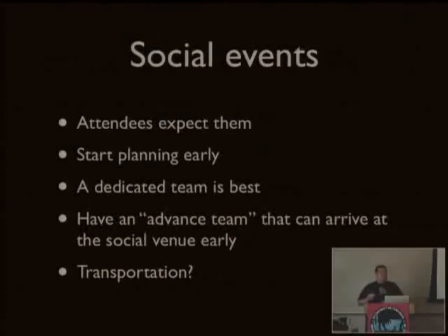Another reason you want dedicated people to take care of your social event is that about halfway through the day of your actual event, those people are going to need to get up and leave and go to your social venue to make sure that everything is set up and ready for whenever the participants arrive. If you have one of your key organizers in charge of your social event, then that means that one of your key organizers is going to be missing for half the day. And that doesn't work out so well.